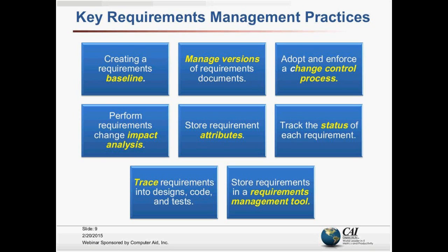Our requirements evolve over time, so if we're writing requirements in some recorded form like a document, we have to deal with versions of those so we don't get confused. You don't want people working from an obsolete version of the requirements. But change is a reality — it's foolish to pretend that change is not going to happen. So you need to put into place and enforce a change control process: mechanisms by which changes can be collected, recorded, evaluated, communicated, and acted upon. An important part of that process is impact analysis — understanding the implications of a considered requirement change.